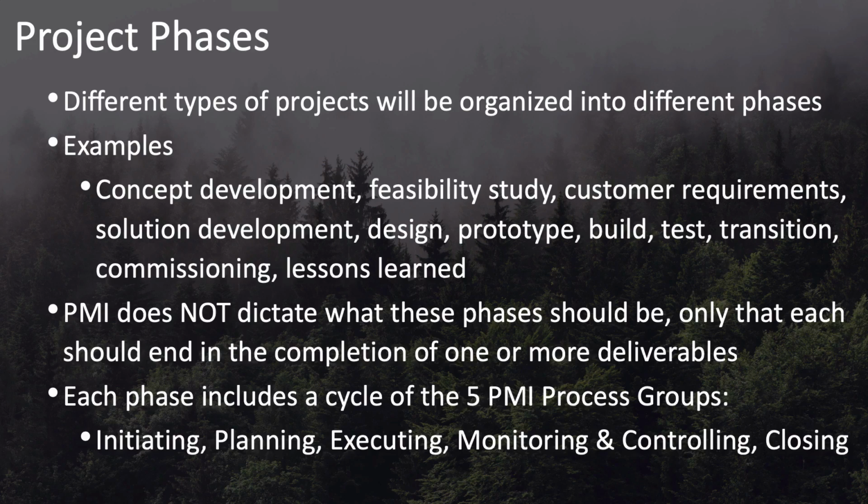You may also have a separate test phase, which tests and validates. A transition phase, in which you take the work that's been done and transition it over into operations, handing over the work that you've done and providing them with everything that's needed for them to properly run or support what you've done. In larger projects, commissioning is a specific phase, which, similar to transition, involves checking and testing everything that's been done and getting it up and running.